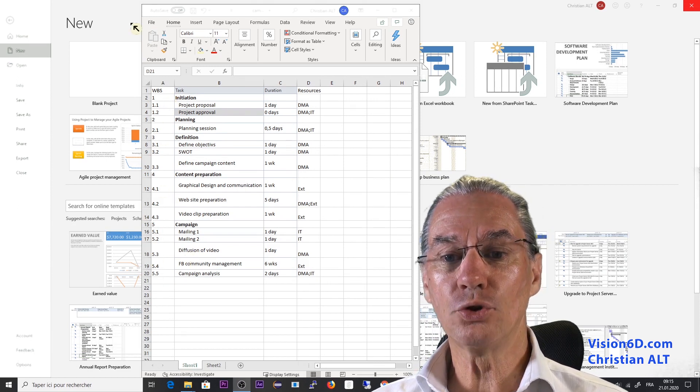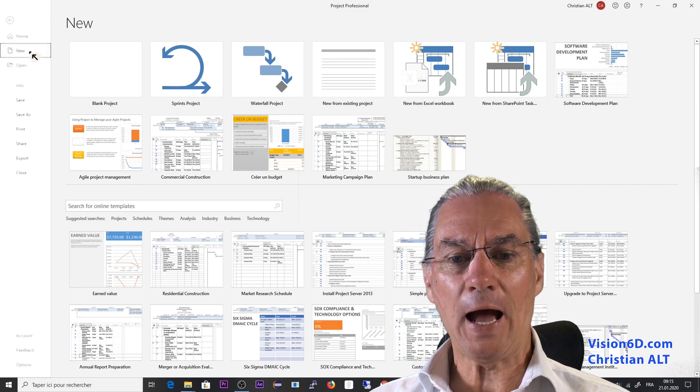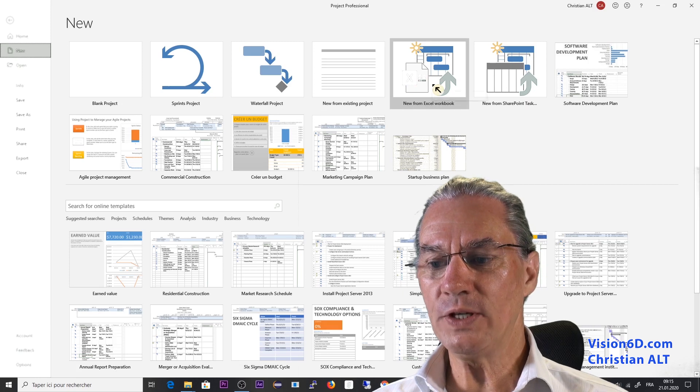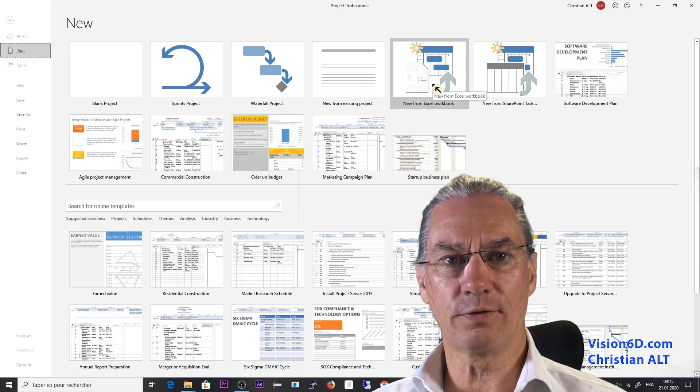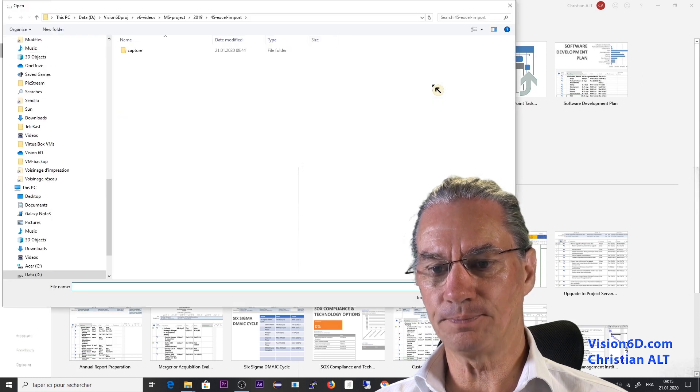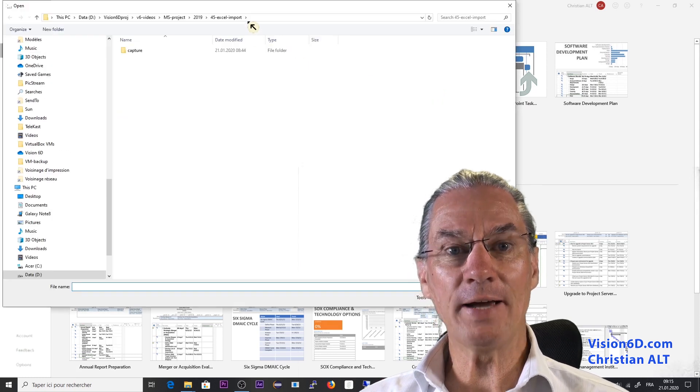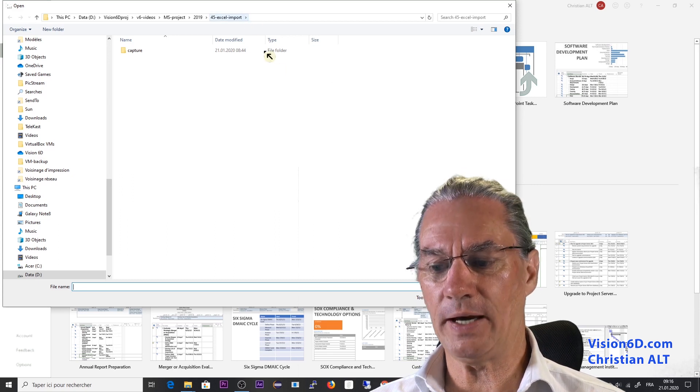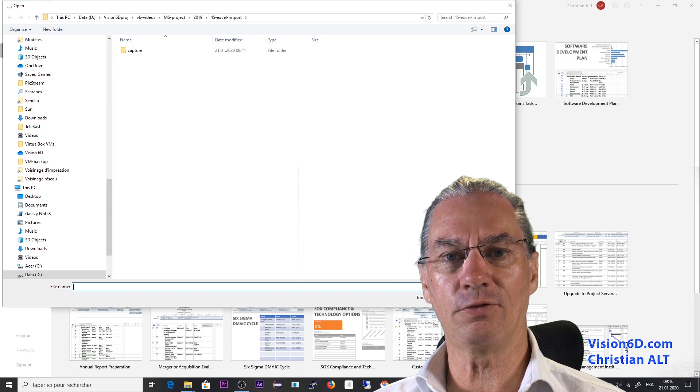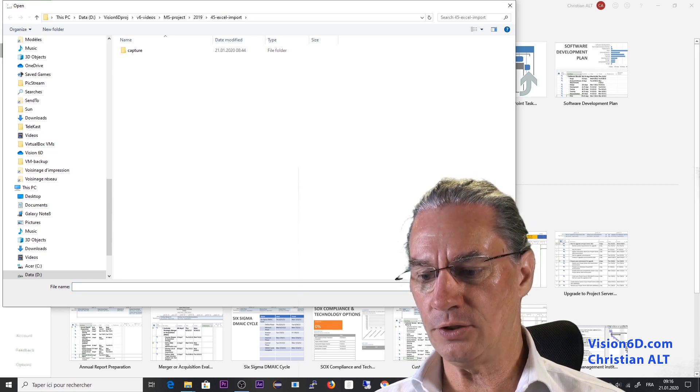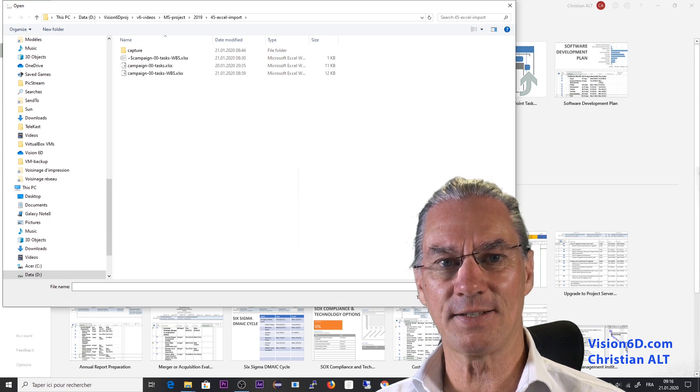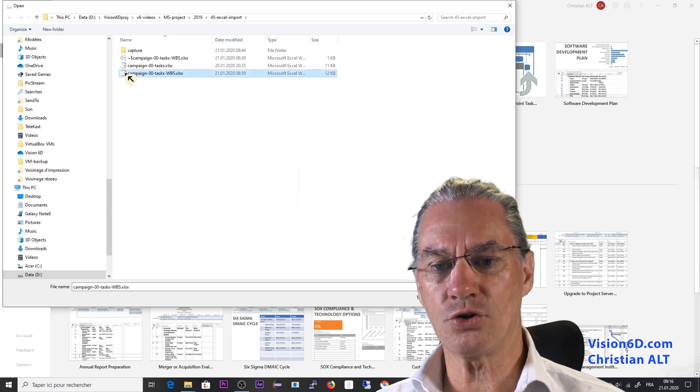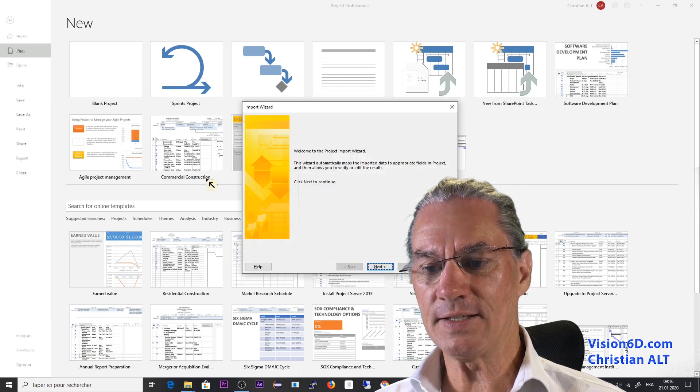Now to go into MS Project I go on New and here we see that I can open a new project from an Excel worksheet. And here I'm in the folder where I should find my Excel file and you see I don't see it because it's looking for an XML format. So I'm going here down and change this to XLSX and here my file is showing up. So I double click on it.